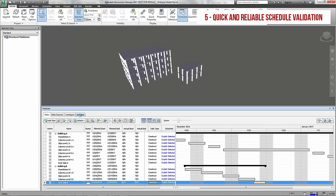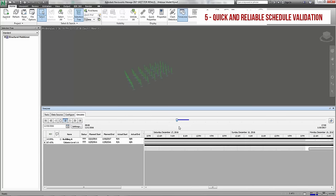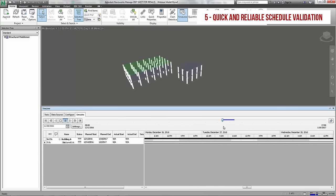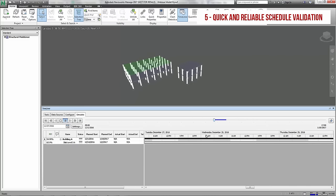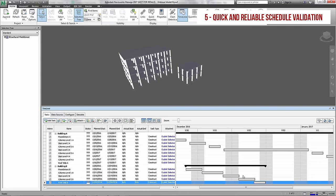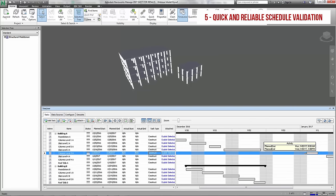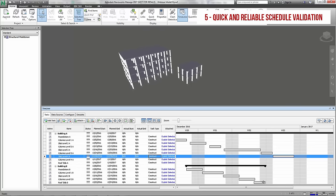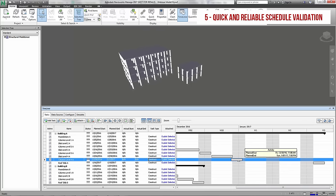In this case for example, we may notice when playing the animation that one of the durations for Slapur is too long. To fix this mistake, we'd have to go back to the tasks tab where we can't see the animation anymore, locate the relevant task, adjust the duration, and then pay attention to fix all of the downstream activities manually.